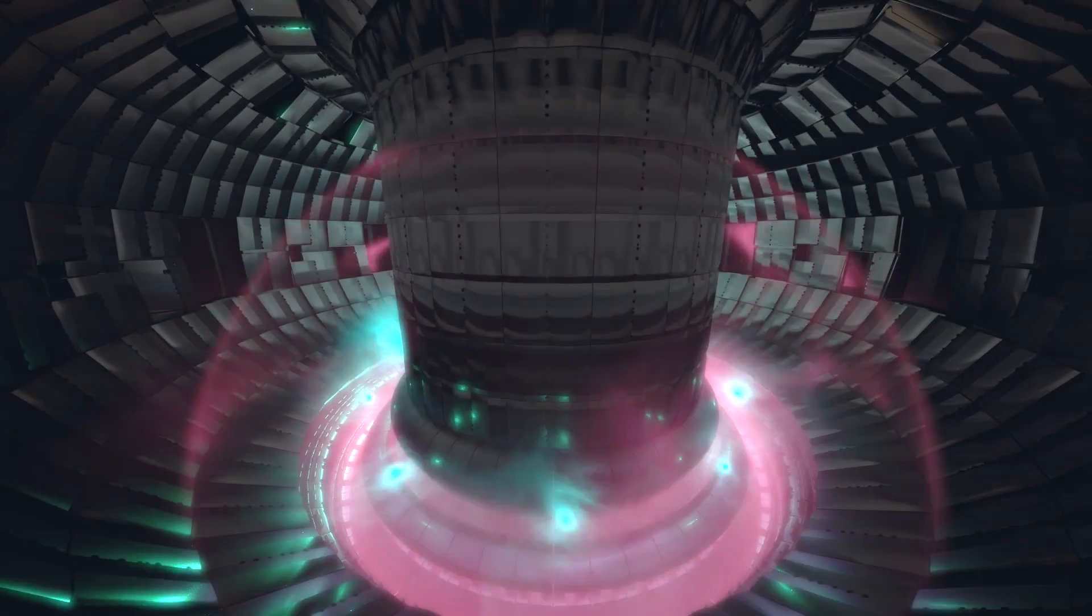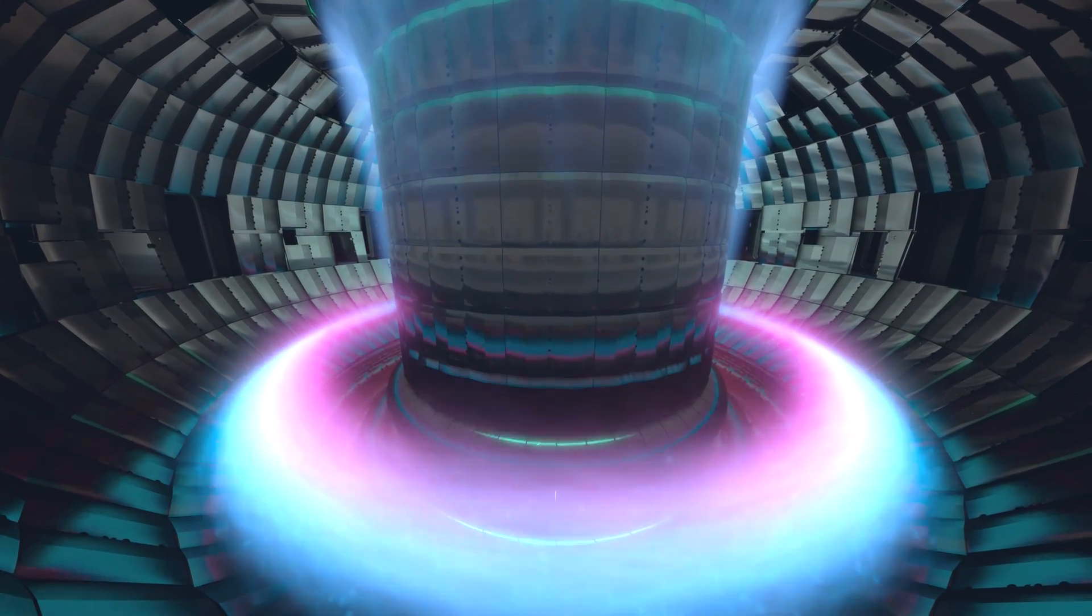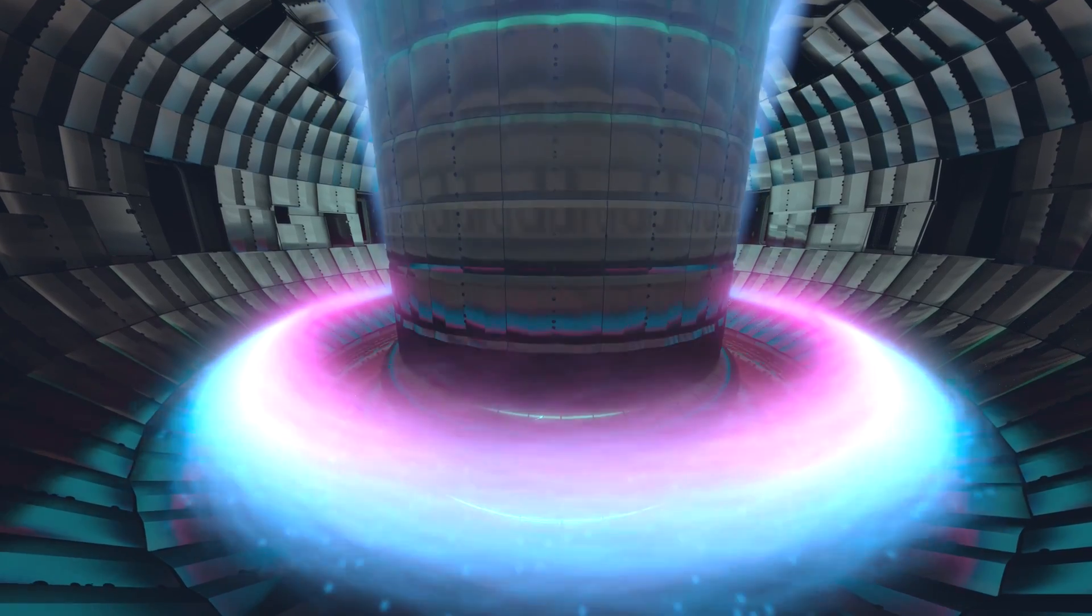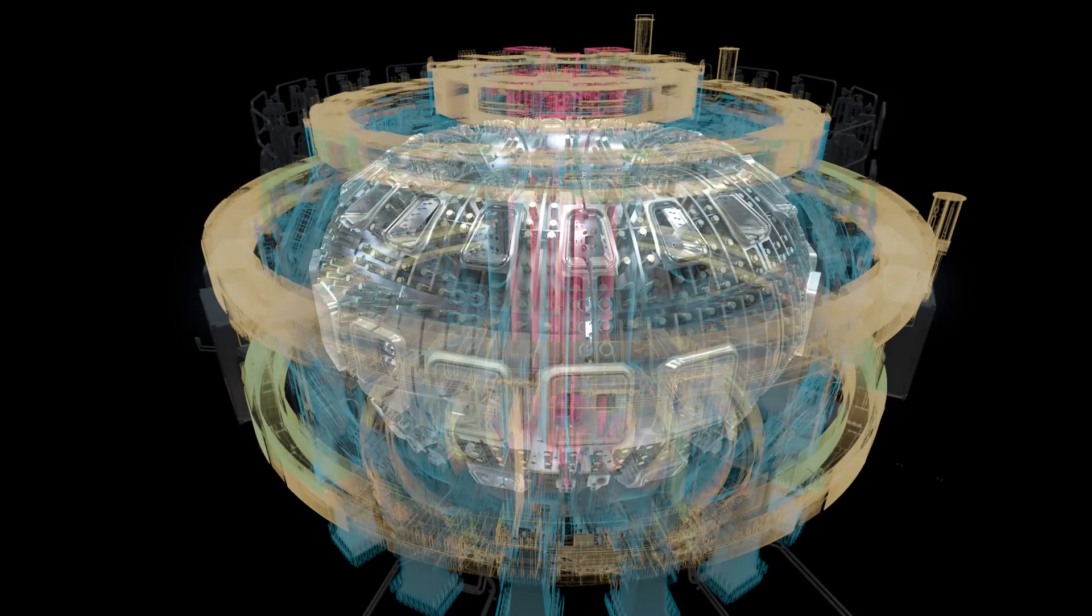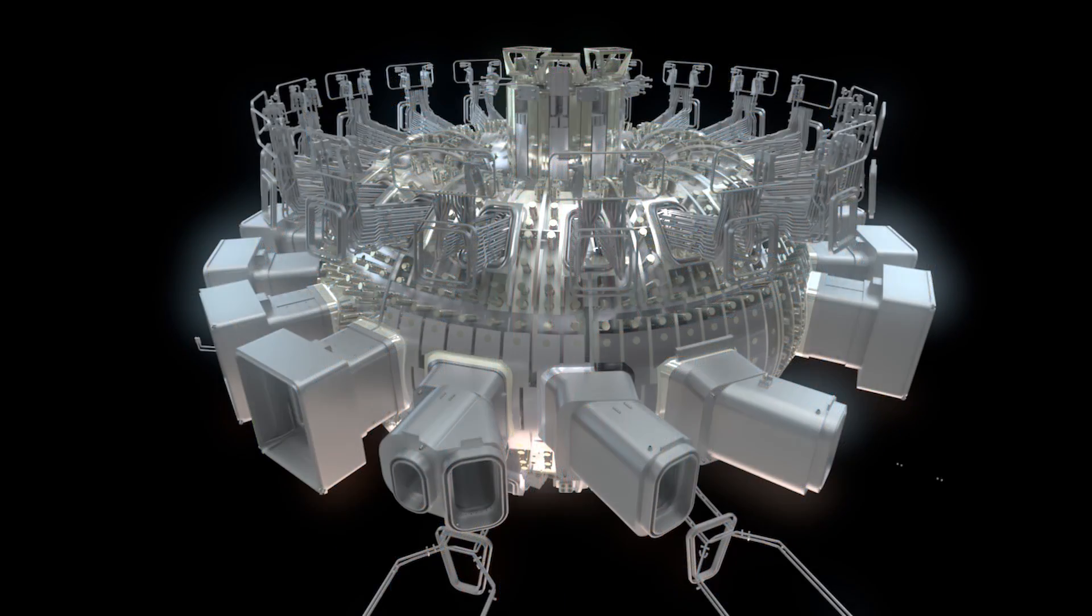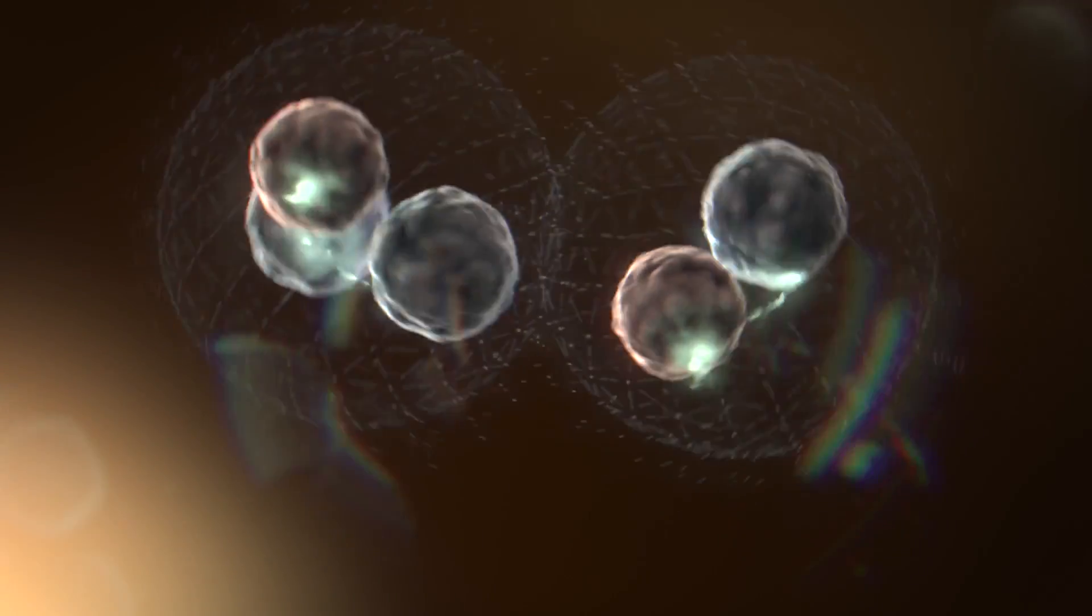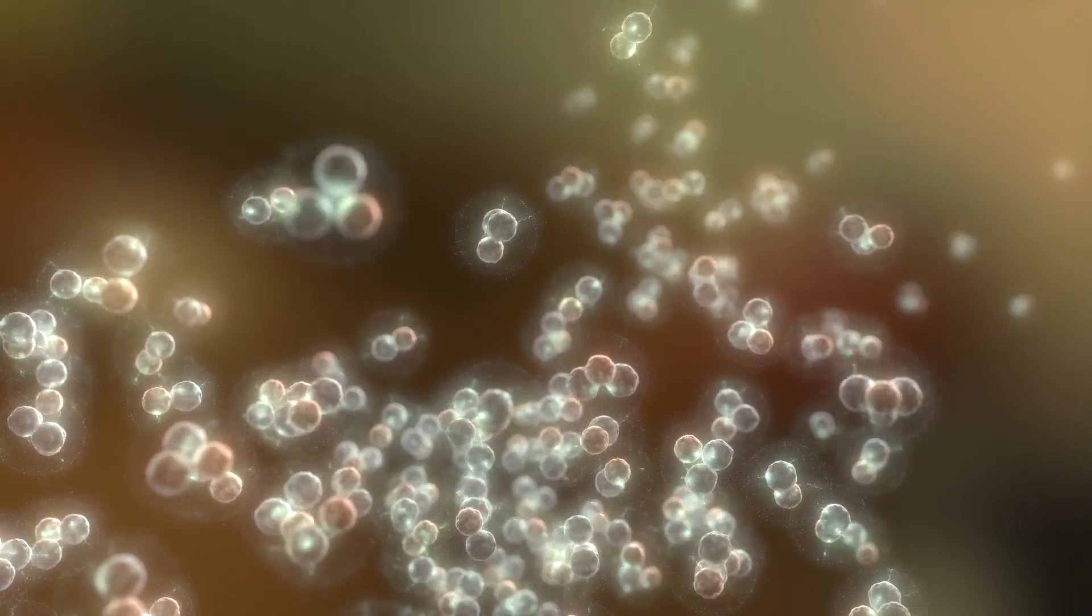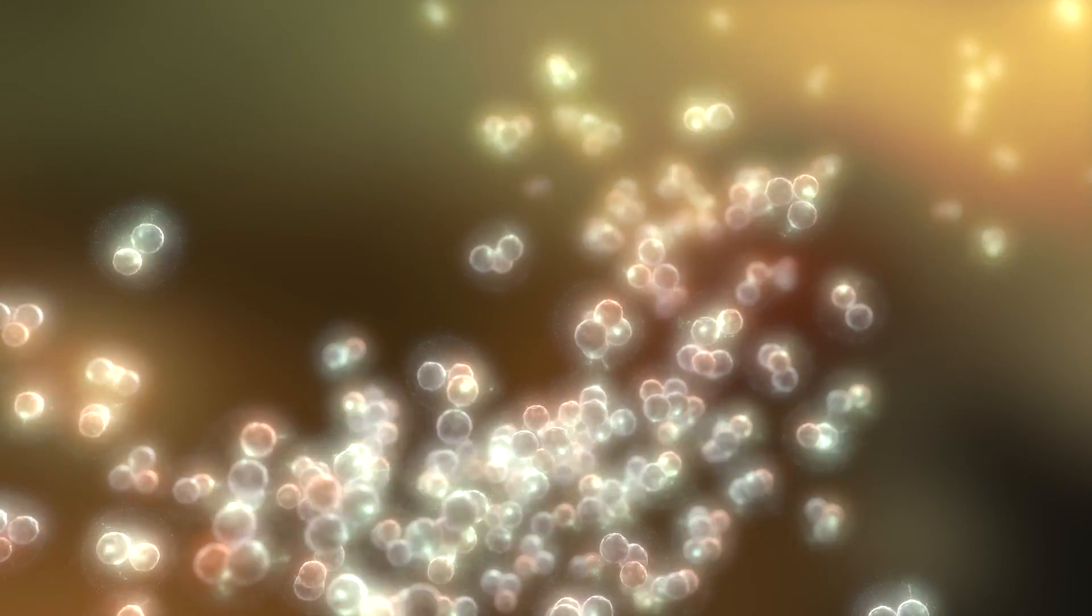Beyond its symbolic importance, ITER's first plasma will be an important trial run for the machine, a first occasion to verify the correct alignment of the machine's magnetic fields and the correct functioning of key systems. The very first low-power hydrogen plasma, lasting only a few milliseconds, will be followed by other shots of increasing power and duration.